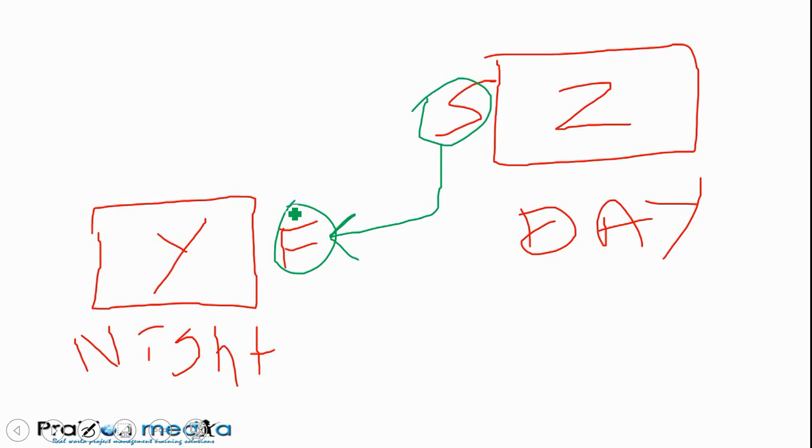Now, you know that when you start, the arrow has to be here at the beginning of the rectangle, the left side of the rectangle. When we're talking about finish, the arrow would point to the finish. So let me say that again. The arrow originates from the start, the left side of the rectangle for Z, and it ends on the right side, right?